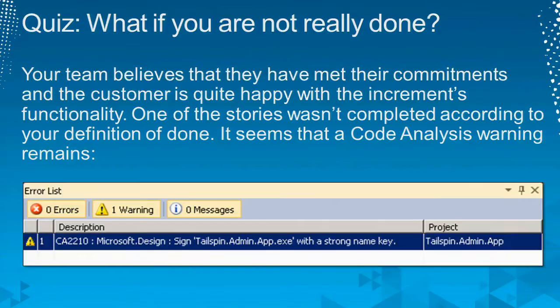So per good Scrum, per good mature team, the team should say, Mr. Product Owner, we don't have anything to demo. We did not complete our commitment this sprint. We were very close. I know you think it's ready to go, but for some technical reasons, we don't feel comfortable showing it and certainly not shipping it. And if you stand your ground, you're going to be like, all right, review's over. It's retrospective time.